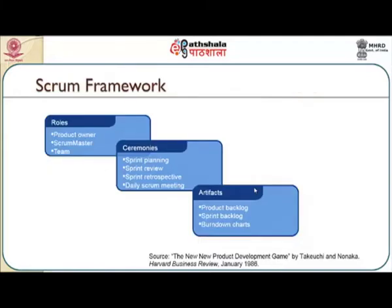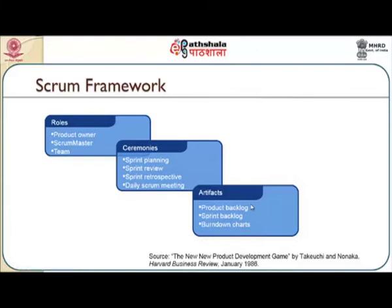Looking at the Scrum framework, there are different elements. The first is roles: the major roles that Scrum focuses on are the product owner, Scrum master, and the team. Next, looking at the ceremonies: sprint planning, sprint review, sprint retrospective, and daily Scrum meetings. Finally, the artifacts — the things to be produced by people involved in the process — will be in the form of product backlog, sprint backlog, and burndown charts, which exactly predict when I would complete what.